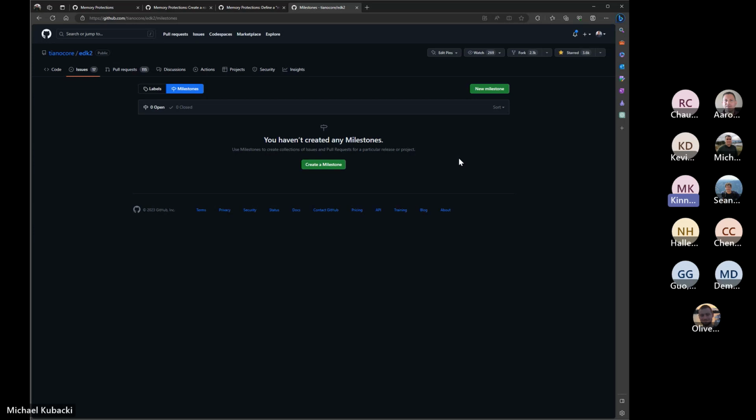I think the way I like to view it from what you've described here, Michael, is that this project management makes sense for new features, big, complex new features. Small bugs, or small features that are done by individuals by themselves without having to collaborate with others, may still just show up on the mailing list as patch reviews and go through Bugzilla because that's what people have been doing. And then we can do the starting use cases for this for big features that require collaboration. Yeah, I think that's a good way to look at it.